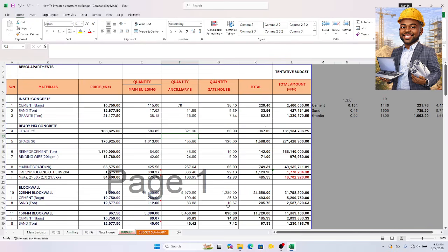Now why do we separate them? It is because the kind of profit or profit margin you put on the general civil work, your concrete or your reinforcement or your formwork, is not the same margin you are going to put on a specialist work, because the contractor giving you his quote already has his own profit and overhead on it. So if you go and put the same profit and overhead, you will blow it too high. You will no longer be competitive in that particular tender. So that is why you don't put that.